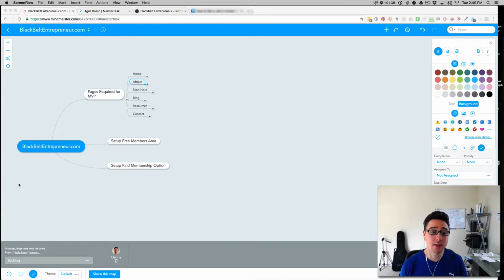How I like to explain it is that you set out a block of time, a week or 2 weeks, and it's called a sprint. You take certain tasks, certain things that you want to get into that sprint to be completed to get that part of the project done. So in 2 weeks, you essentially are shipping something, right? Every 2 weeks, you're doing a different sprint and you're adding new functions and features in an iterative fashion. Planned, iterative, fast.